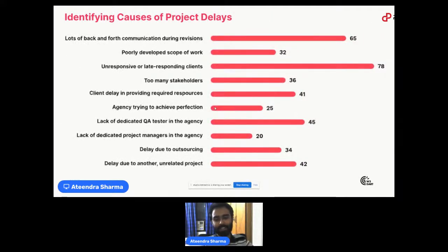So when we started in 2016, as you can see on the screen, this is the exercise we did. We counted the number of times a project got delayed due to a particular reason for just 12 weeks.